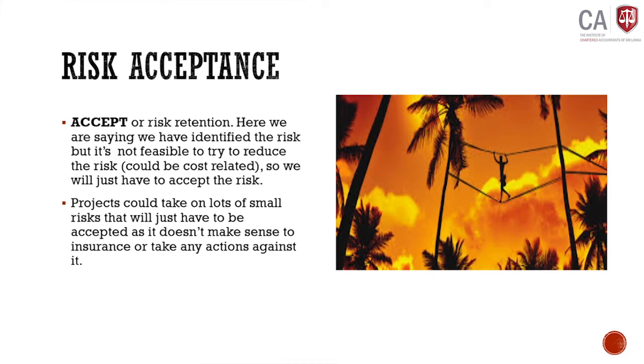As an example, when we are storing explosive items, or items which can be perishable, it's a risk, and we have to incur some additional cost. Therefore, by nature we have to accept such risk. Projects could take on lots of small risks that will just have to be accepted, as it does not make sense to insure or take any actions against it.